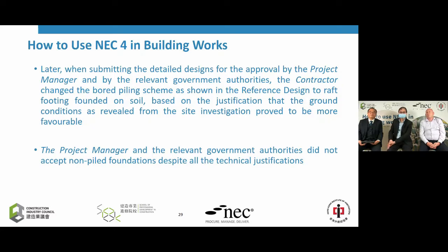And the justification put forward by the contractor is that when they entered the site, they did some more site investigation, and they found that the ground conditions proved to be more favorable than had originally been contemplated. But you know, people always like conservative design in Hong Kong. So the project manager and also the relevant government department, they all want the contractor to stick to the original bored pile foundation instead of a rock footing founded on soil. So that gives rise to dispute.